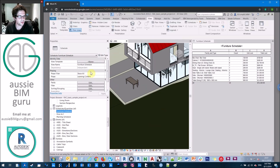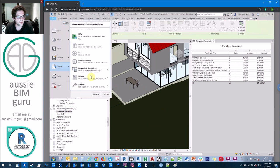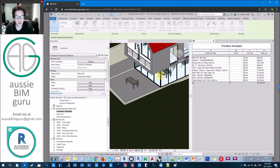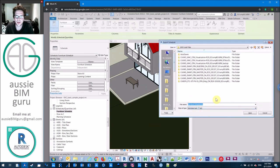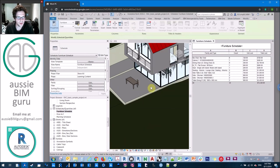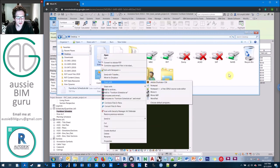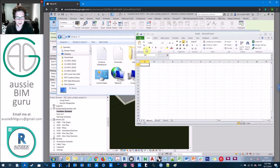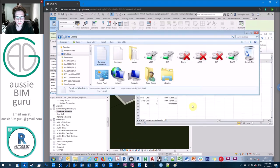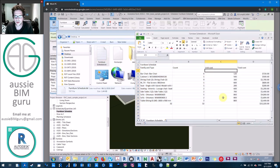You can rename the schedule and if you're happy with it, export it to Excel. Under export, scroll down to reports and schedule — it'll output as a delimited text file. Save it, navigate to the file, drag and drop it onto Excel and there's your schedule. It comes in unformatted but it's all there for use. You can also use Dynamo to hook that up as well. So that's method one — there are three more.